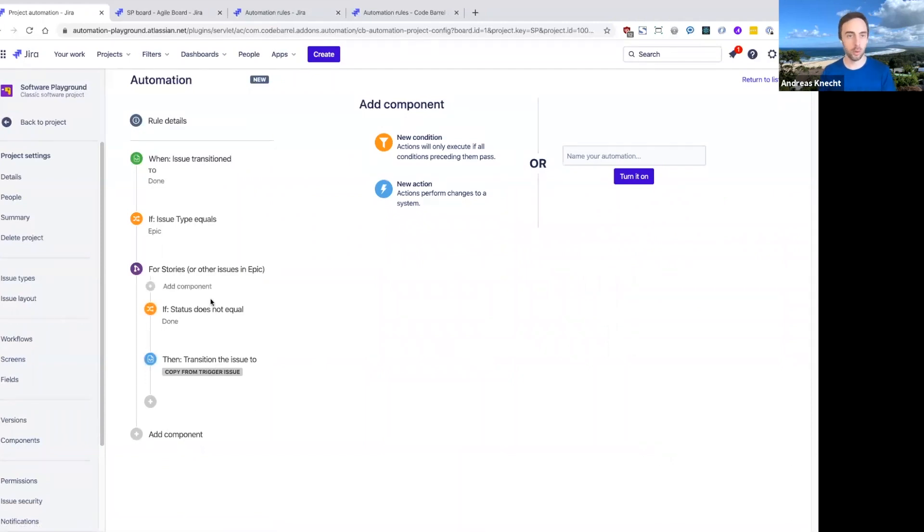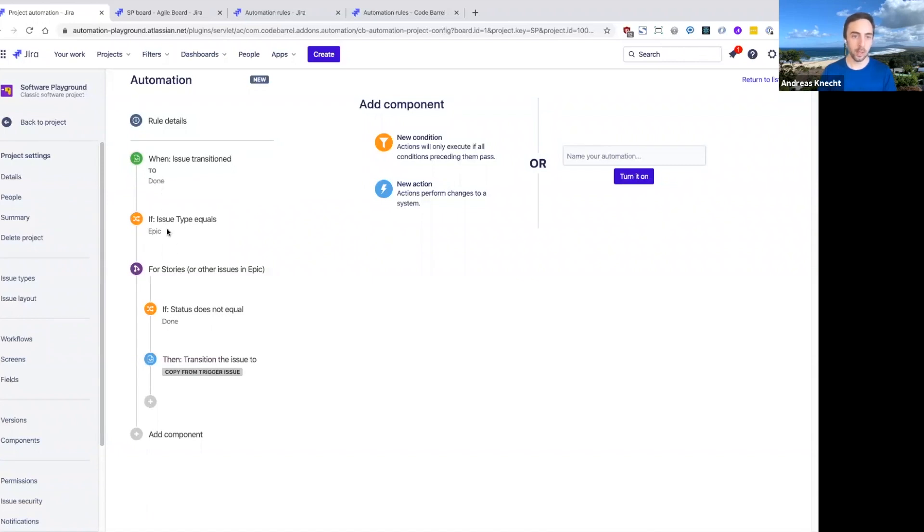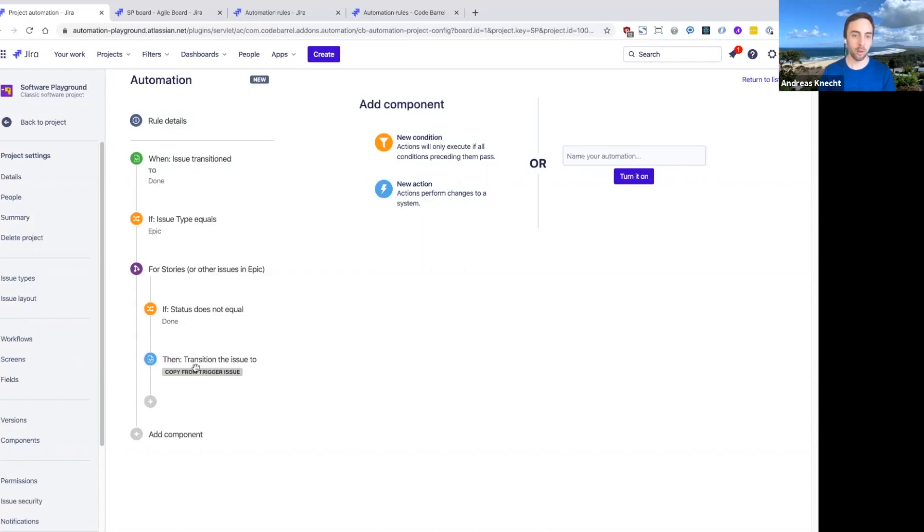Just to go over this rule again: when an issue is transitioned to done, if it's an epic, then we're going to navigate to all the stories in that epic. And if those stories are not done yet, then we're going to transition those stories to done, which is the same status as our trigger issue.